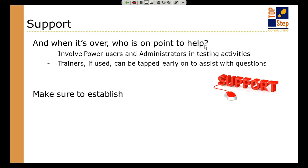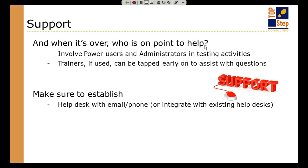When it's all over, who are you going to call? This is where you set up your support lines — your power user or system administrator for the PSA, or the owner of a process who is the go-to person to answer questions. There will always be questions no matter how well you communicate and train. Make sure you have some type of help desk in place — whether it's just somebody's email address, a dedicated distribution list, phone number, or integrated with existing IT help desks. Your IT department may be able to pick up some of the work for PSA solutions, or a PMO office can be your help desk when it comes to process change.